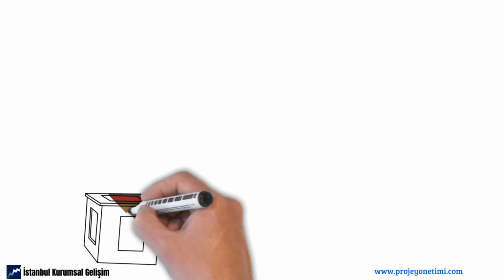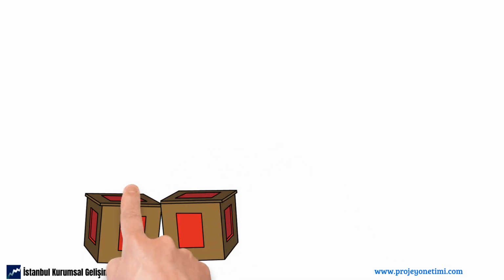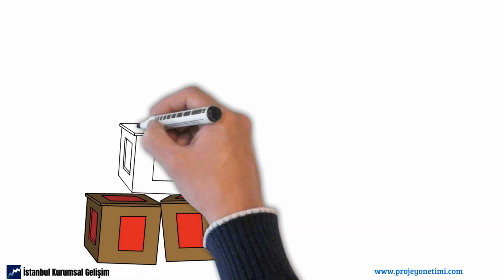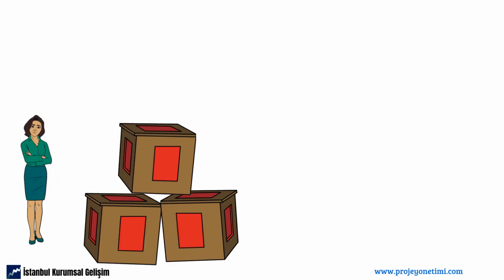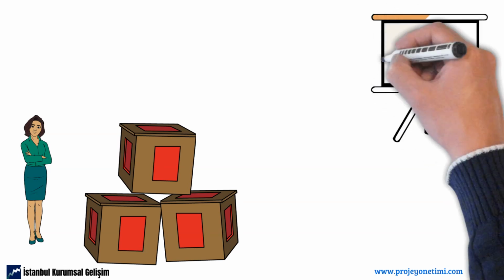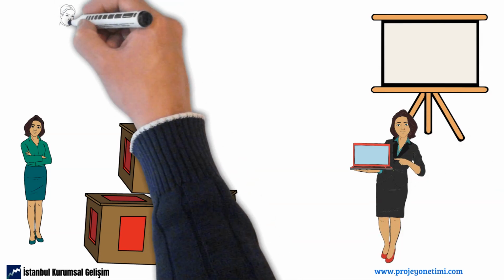The Scrum team will demonstrate the product increase or changes they have made to the stakeholders to gather feedback. This is the highlight of the meeting. Stakeholders examine the result and express their opinions about the result. The Scrum team should refrain from making a presentation at this meeting.